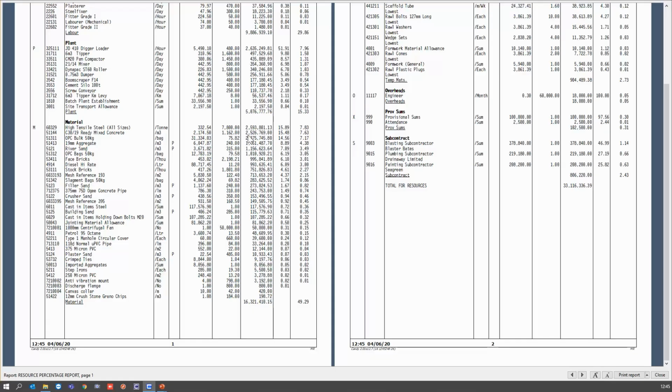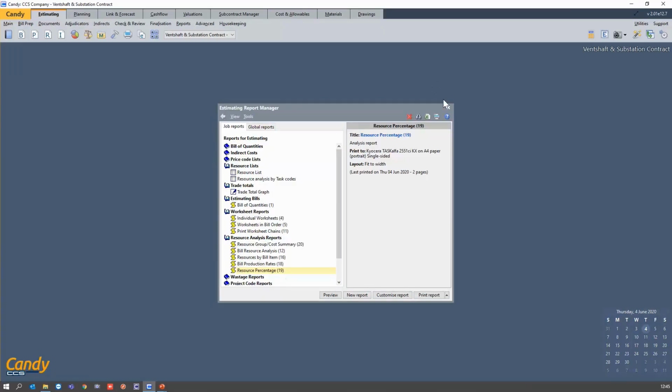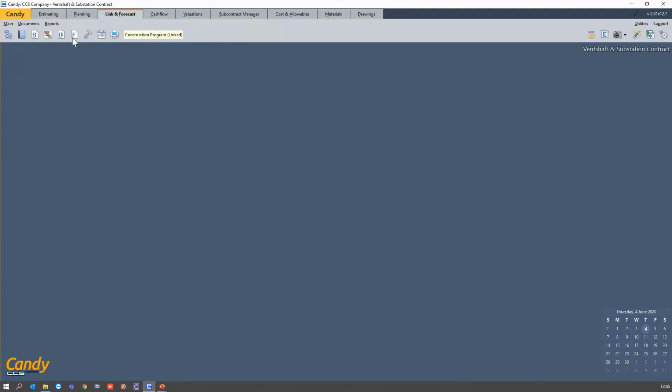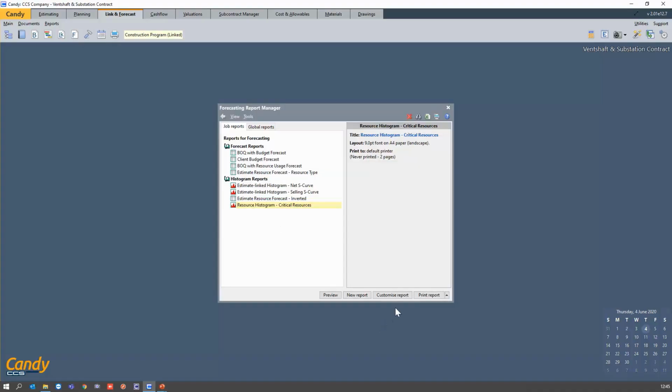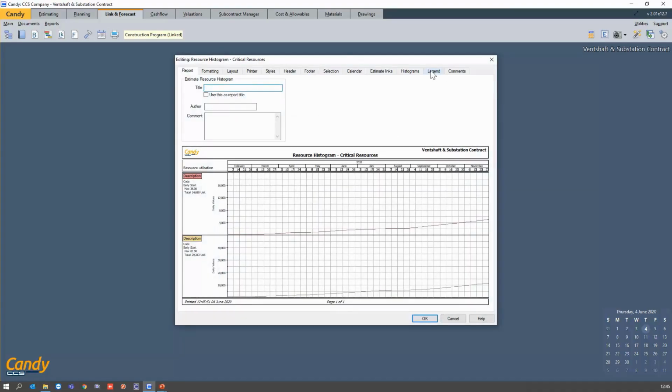It amounts to 2.5 million, 2.5 million, and 2.3 million. It contributes to 15% of my entire material type and 7.8% of my entire contract value. So I've selected these activities and marked them as critical activities. If I go to the resource reports again, I just want to show you.